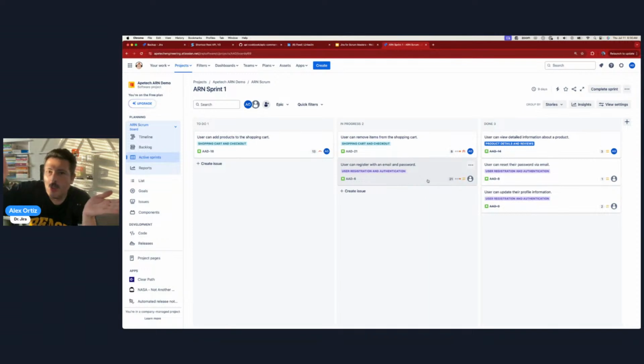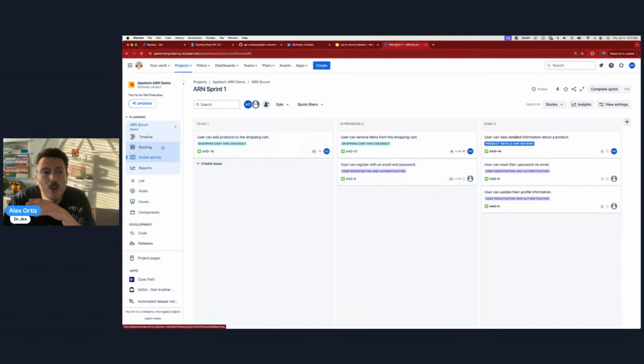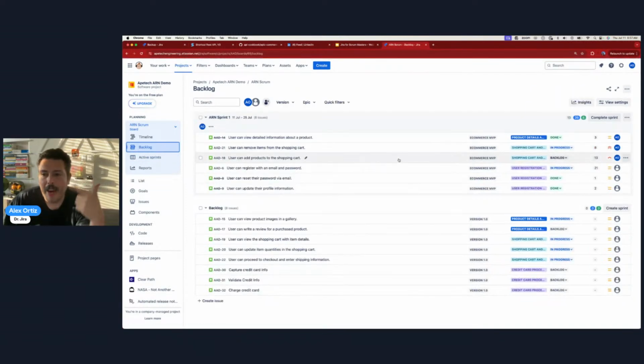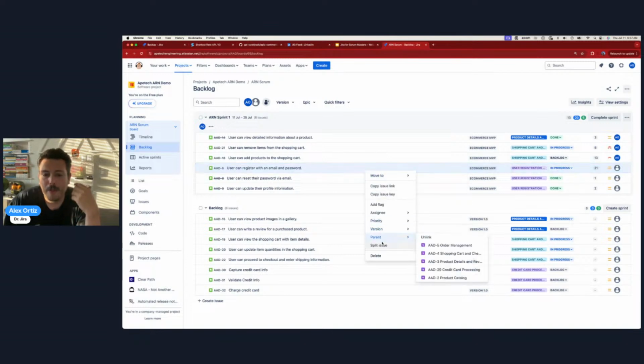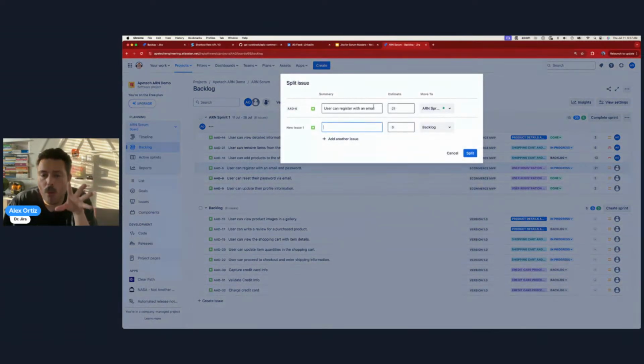over 2, 3, 4, 6 sprints into the future, right? Like your team's just going to continuously roll that story over. My preference is to go back to your backlog, find that 21 pointer, and split the issue. Take credit for what got finished, and then be more disciplined and make better stories that can then be more strategically planned in the future. Okay, that would be my preference.